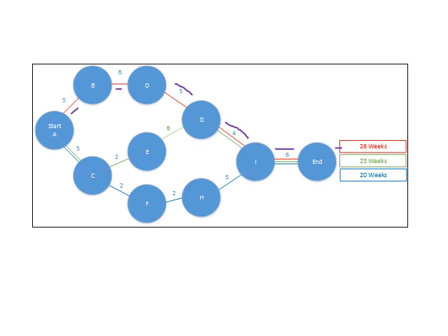If there is any reduction in time, this is the path that you want to reduce items on, because after you've reached 23 weeks, you might even have a look at reducing an item like E or so.